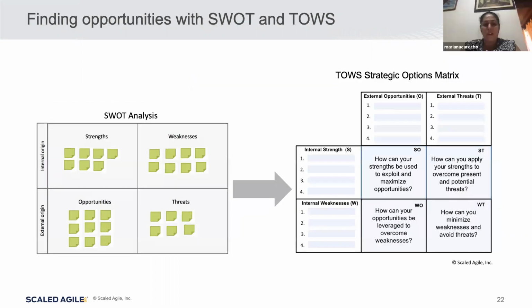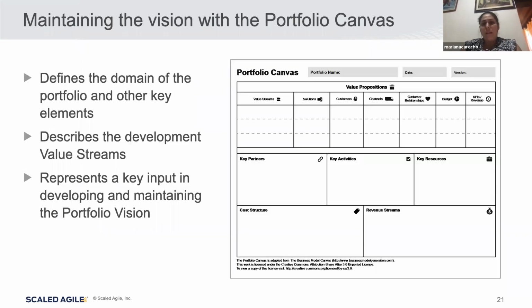So just one question, sorry. Like this canvas, I have to do one for each business line, but then what's the granularity? Because let's suppose I have epics, so do I have to do a canvas for each epic or no? It depends. I think it's more likely you would do one of these if you have a major epic that's going to span release trains, or span many PIs, that maybe you need funding for. You're going to have things that might be more feature level on the release train. They might be not so big. Those you may not necessarily do this for.